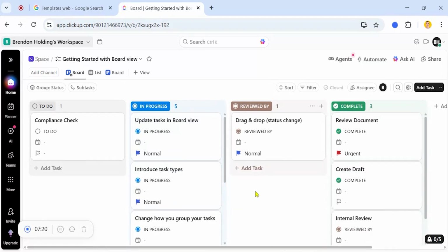Nothing really needs explaining. In daily use, across multiple teams, they don't have to update reports. All they have to do is simply move the cards. If something is stuck in review, for example, for too long, everyone can see it instantly and act. That's how Kanban reduces follow-ups, meetings, and status checks. It's a live update for the current status of your process.